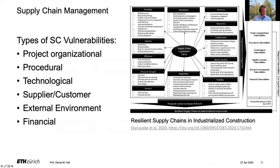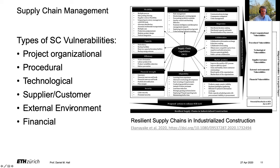If you're very interested in supply chain — it's not the focus of this class and probably deserves its own class — but there's a nice paper about resilient supply chains and industrialized construction that identifies supply chain vulnerabilities. They could be project or organizational, process-related, technology failures, suppliers or customers not providing or paying for goods, the external environment — the Suez Canal blockage comes to mind, which a neighbor working in supply chain told me will take months to recover from globally — and finally, financial shocks, where individual companies in the supply chain could go out of business and disrupt everything.